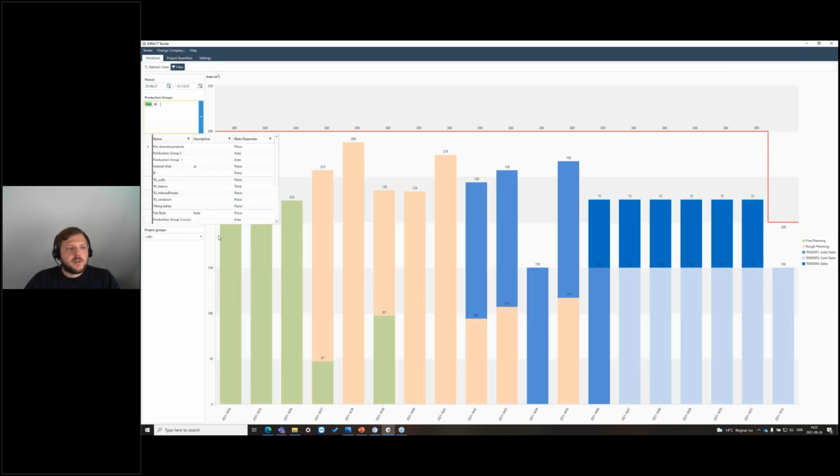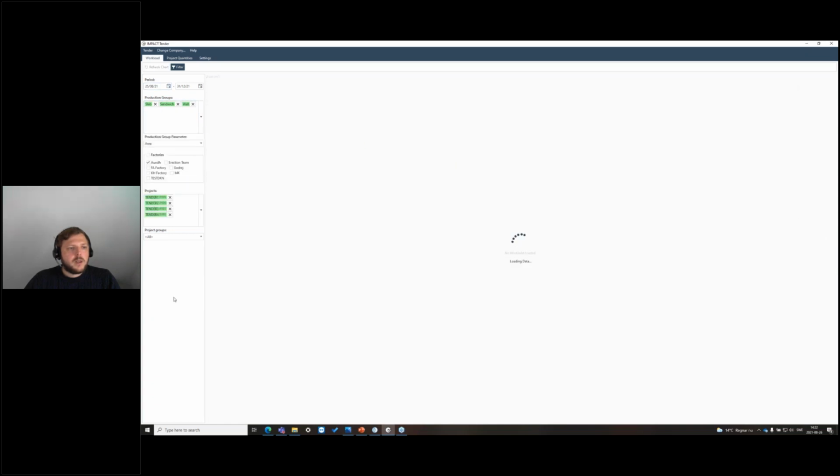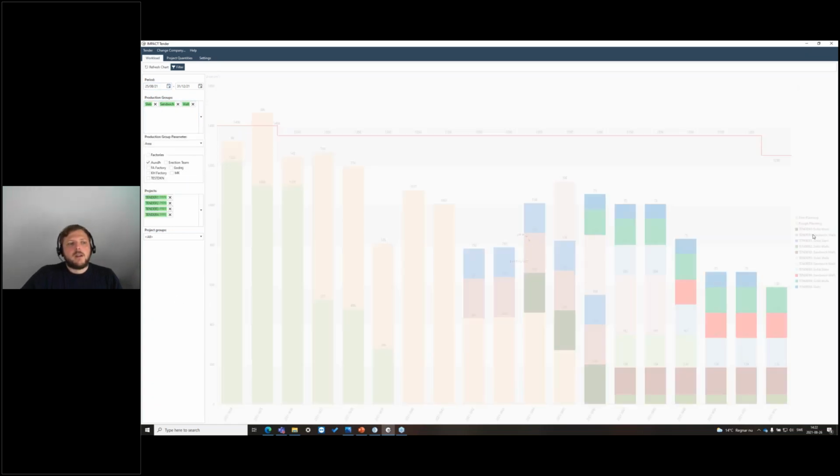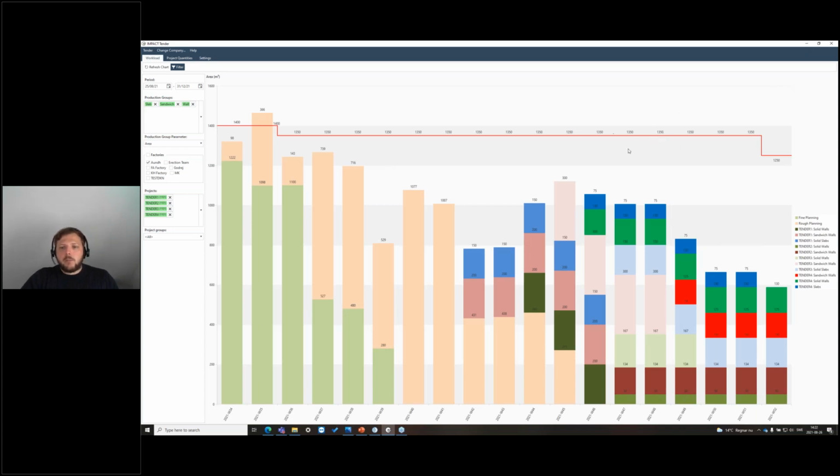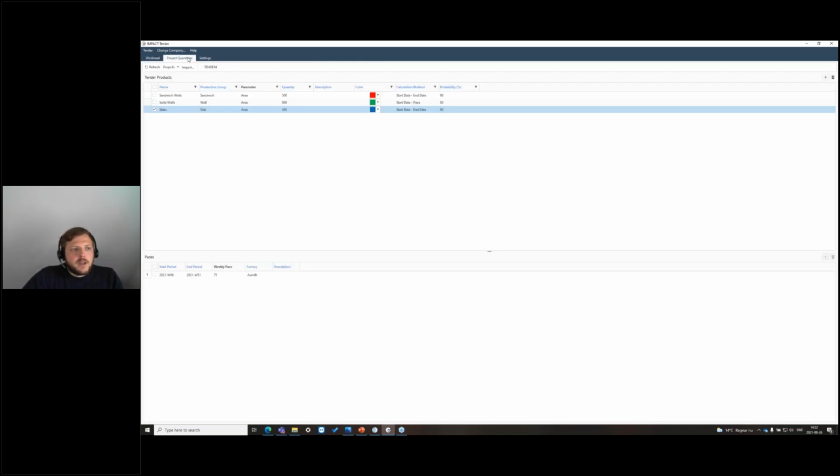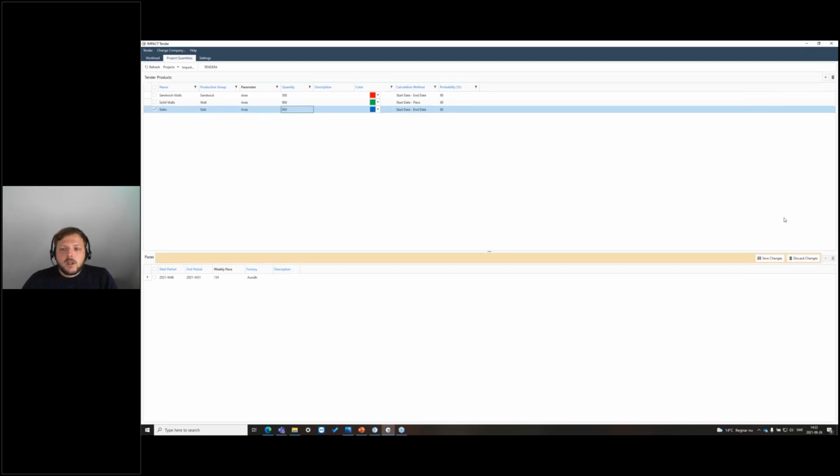And if I just start my sandwich and walls as well, you will see the combined capacity. You see that you're well below here, so we can probably fit in some more tender projects. And it's very simple to change things. So let's say that, okay, I was wrong. We thought that we're gonna cast 450 square meter slabs, but it's actually 800. Then you just save here, and it will update automatically here.